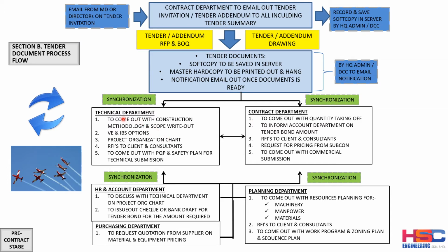Okay, the first is the technical department. When the technical department receives the tender document, they have to identify the construction methodology and the scope write-up that is required in the tender document.